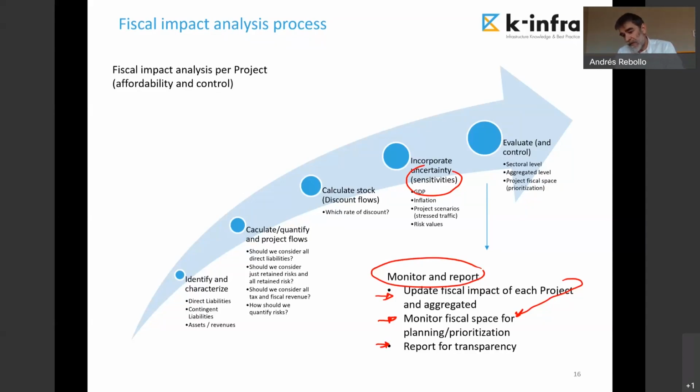That should be the value that I should take, because if I take the P50, that means that I have 50% chances that the value that I am assuming is not bigger or lower than the final possible real value if the project eventuates, because it's the most likely value that will represent 50% of the possible consequences.